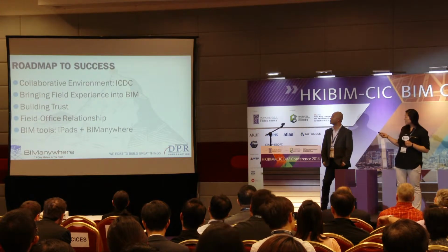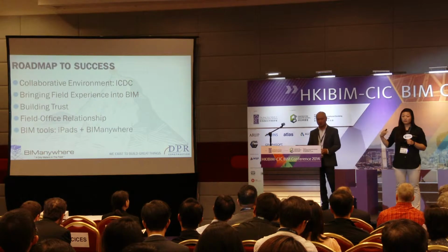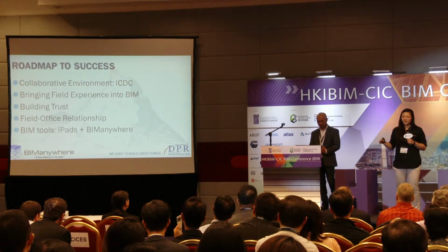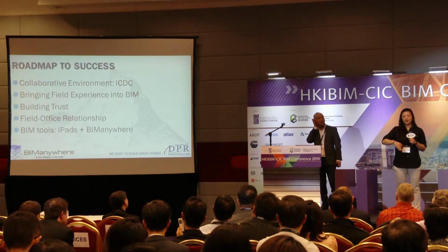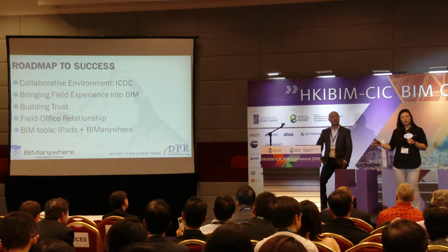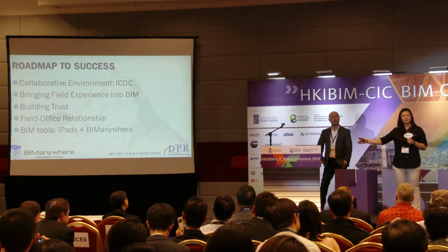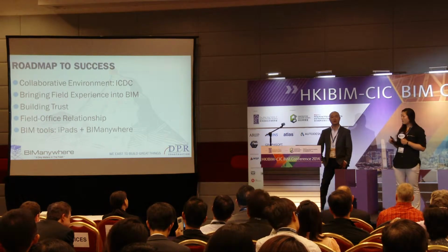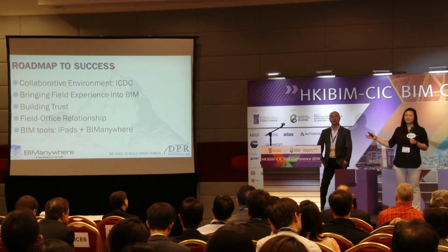Bringing field experience into BIM. This is something that we actually learned a lot from. All of our subcontractors bring their field guys into the office, teach them how to use a computer, teach them how to model, and they're actually the ones doing all of the modeling. They have X number of years of experience knowing how to install plumbing or ductwork, so they're bringing that knowledge into the model.